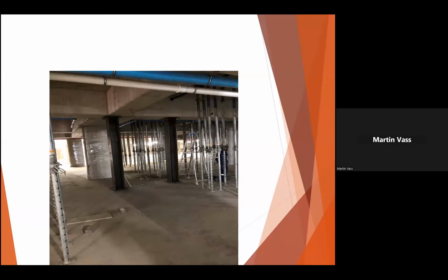What's going to happen now, they're going to put some concrete around these to make them look more aesthetically pleasing, so they'll match in with what's there. But the problem now is we've lost 54 parking bays. There's one building still to construct, so on the last building they're going to put in a further parkade. Instead of having 2 parkades, they'll have 3 levels of parking to supplement what we'll be losing here by putting these additional steel columns in place.